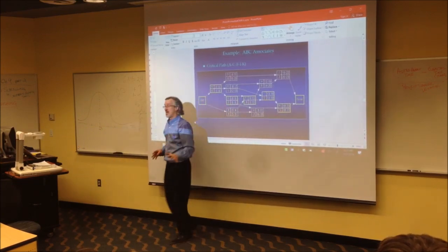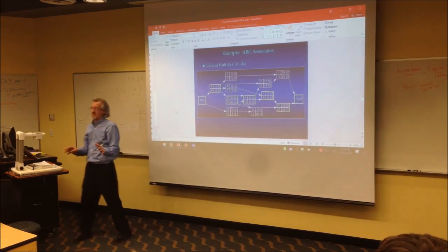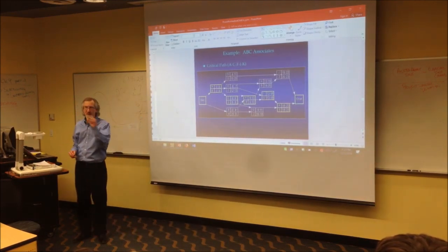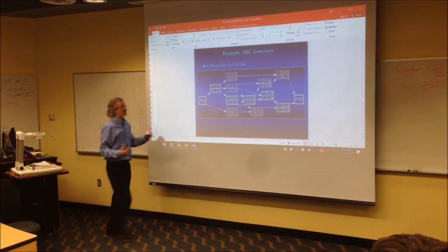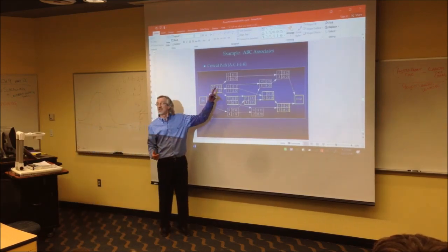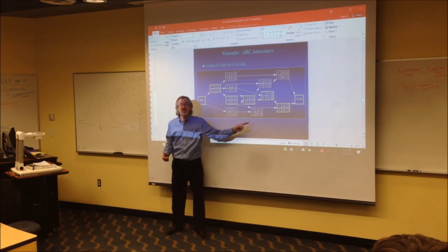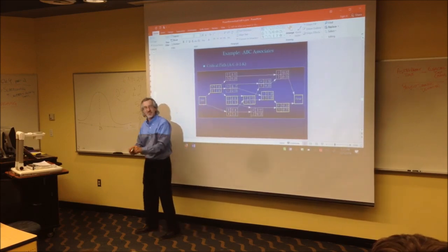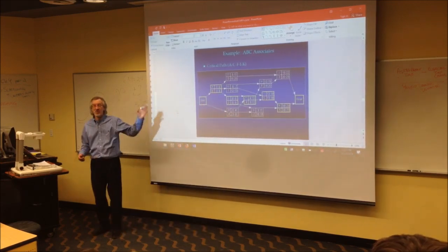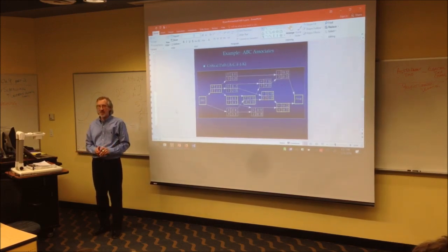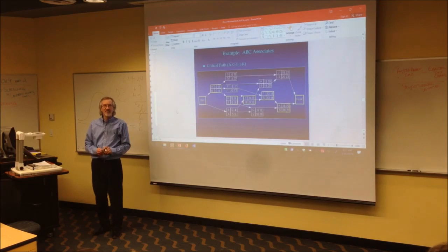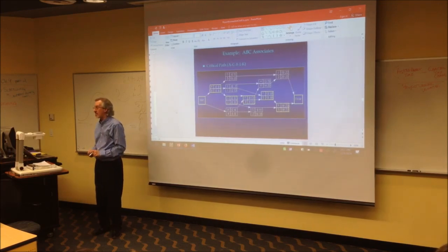I'm going to save you a lot of time. Every semester, somebody is going to figure out the variance for every one of these activities, and you're going to go, why do I not have time to finish this step? You only find the variances of the critical path. Save yourself time. Everybody hear that? You only want to find the variances of the critical path.